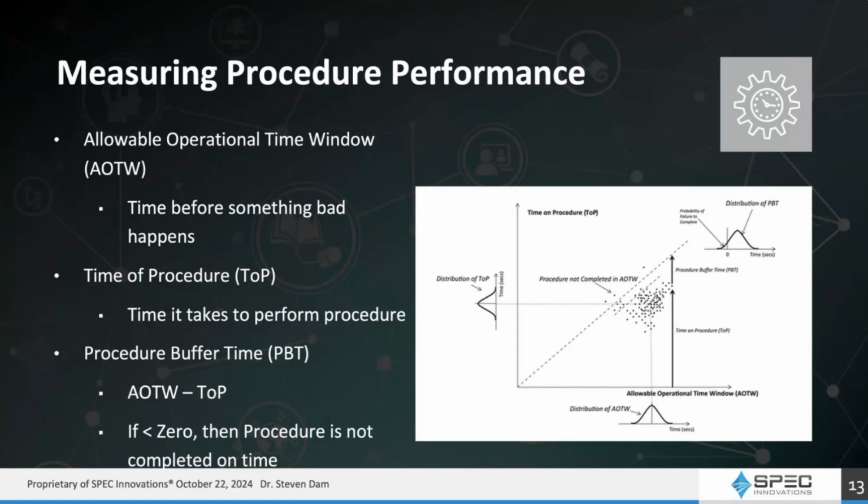Now what we want to do is look at the difference between the two. These are distributions I'm taking a difference of, not single points. So I'm looking for where it fails, where it goes less than 0, which means I ran out of time. That's what the analysis is doing.